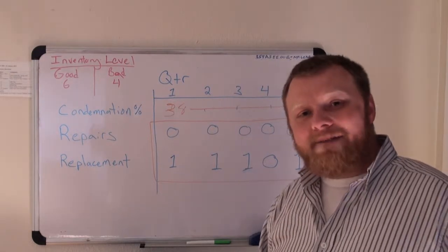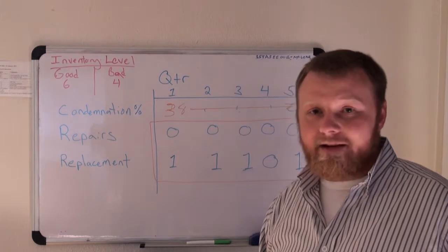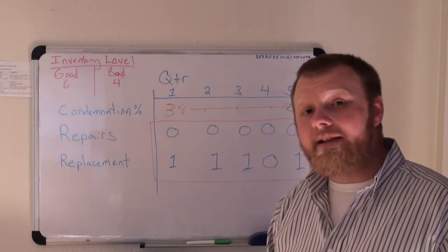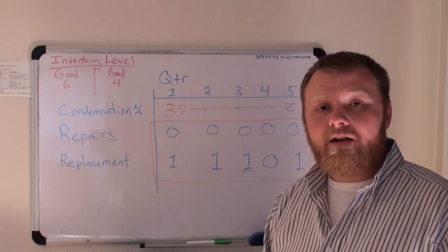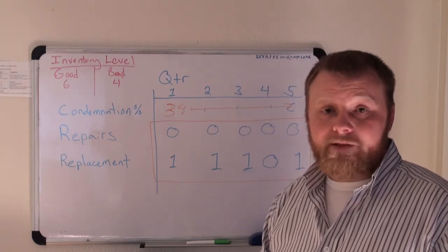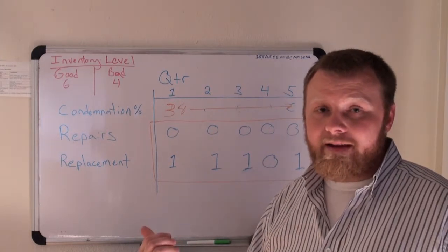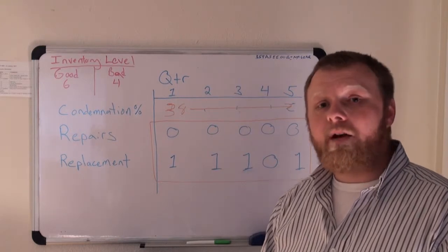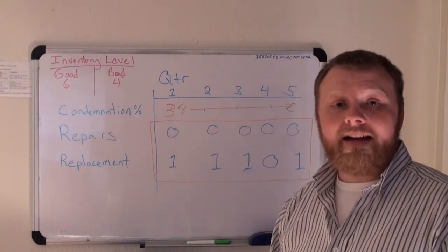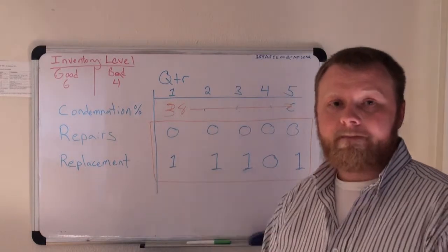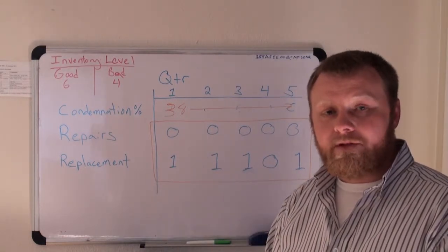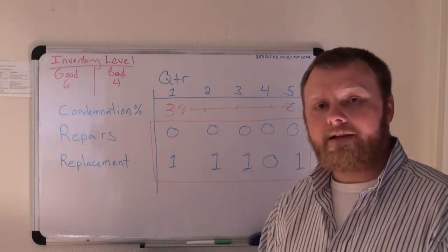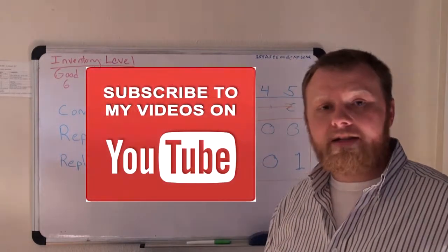What am I going to do? I have to buy brand new parts. So that's when the other side of the story comes in. How long does it take to buy a part? How long is the lead time to get the contract in place? How long is the production lead time to actually build the parts? It better not be over 2 years and 1 quarter, or we're going to be hurting. We're going to have to find other means to continue sustaining our business. So therefore, that's why it's imperative that you get your data correct and that the systems are reading the data correctly. And that concludes the ES session for the week.